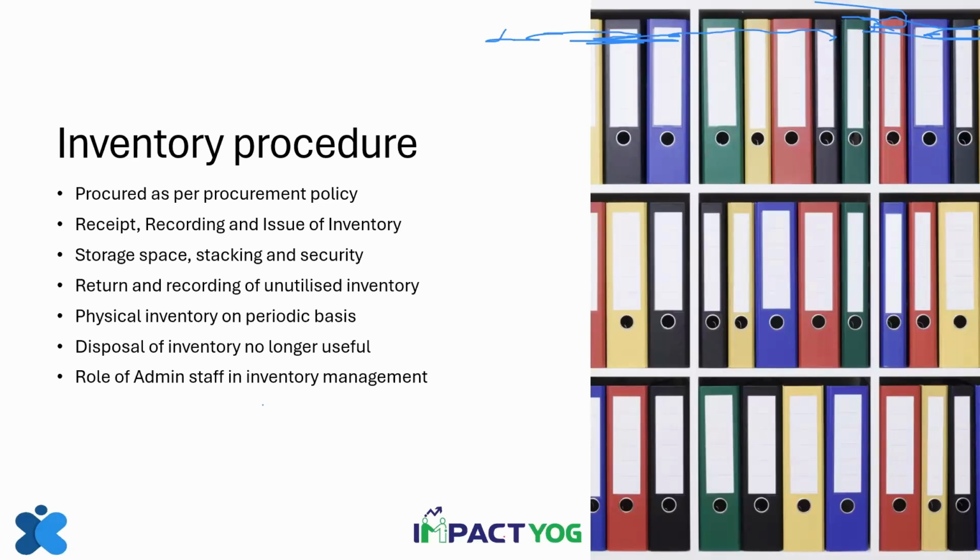The admin person is not responsible for that. So you needed 1000 brochures, but you printed 10,000 brochures, and they are not being used. After 1 year, the project is over, and those 9,000 brochures have to be sold as scrap or waste. Rather than that, you could have got two types of brochures printed, and the beneficiaries would have benefited. Your program would have benefited. That is what I'm saying.